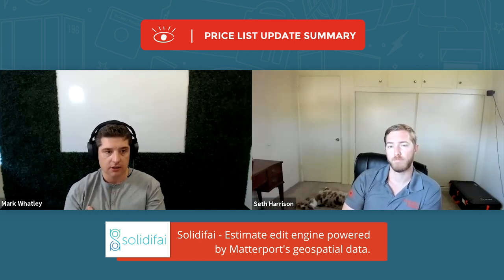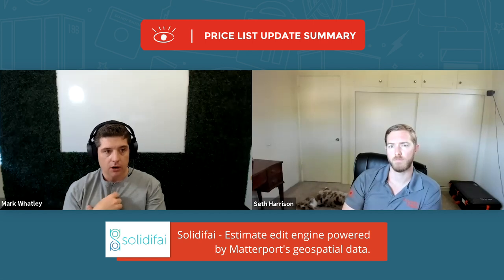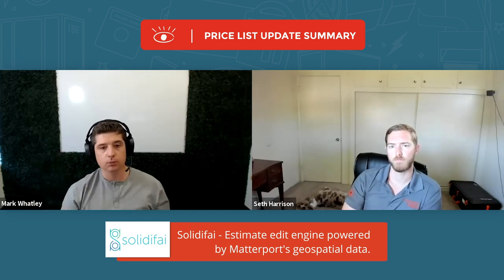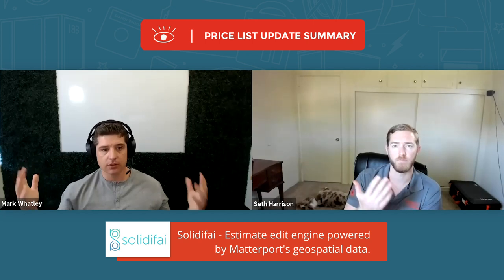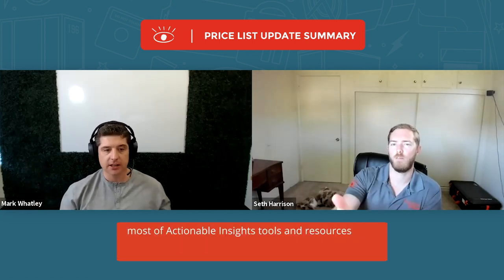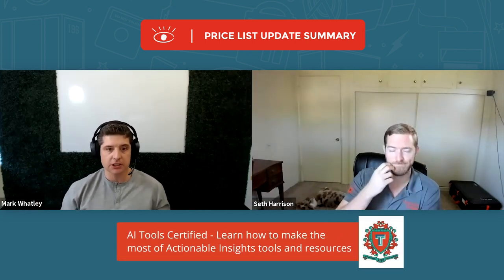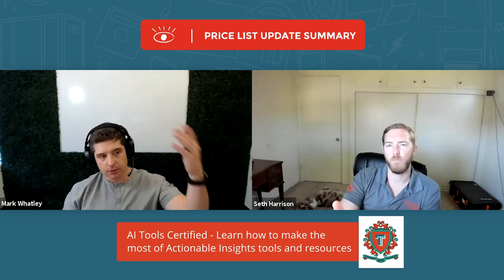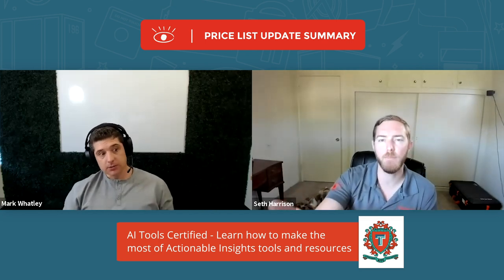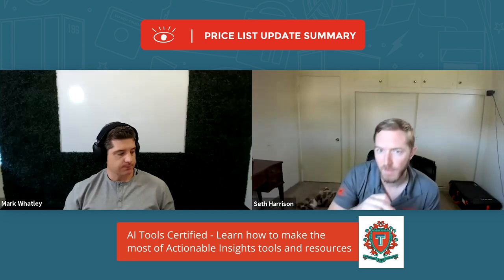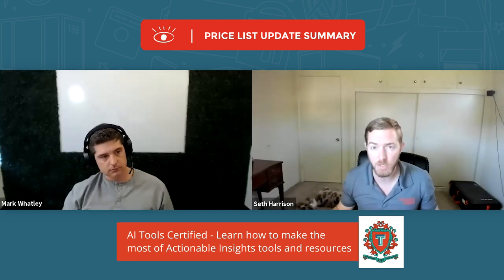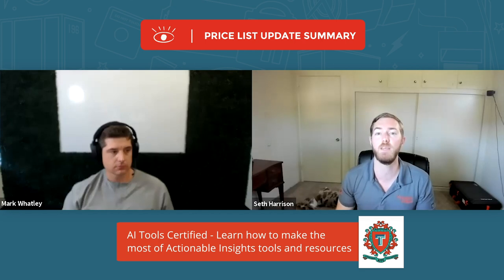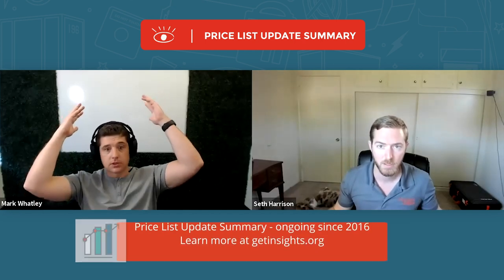Notice there's no mention to overhead and profit, right? That's the thing that gets so conflated because the, which it didn't, and it really has to, but it's so confusing the white paper, because it does say that overhead and profit or project management is rolled into the line items, right? And if you look at that in a vacuum and you don't read further, the next line, it says that it's adequate project management, for that individual trade. So if you hire a drywall, there's enough management hours in there for the trade to get executed under the direction of a GC. So this particular activity, this does smooth the way for that impasse not emerging. So, okay, clearly it's separate, but don't bill me as a carrier for eight hours a day for the eight weeks you're on site. And I think this is why we can't have nice things. You know, how many times did you and I hear from these contractors? Like, Oh, like you can't get paid for project management. Well, why? Cause you just stuck a bill in there for $16,000 of project management on your $60,000 repair bill with no explanation. And like, that's how we got here. So, the government's trying to cut through this, right?